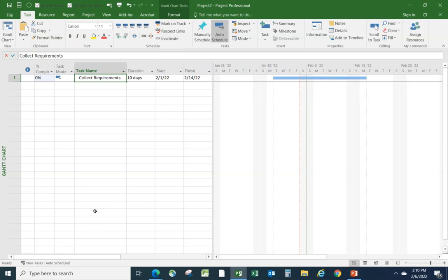All of those are possibilities that you might hear from people. And so it tends to be better to tell Project what the scenario is rather than feeding in a percent complete. And by the way, if I feed in 25% complete, Project assumes it started as it was planned to do.